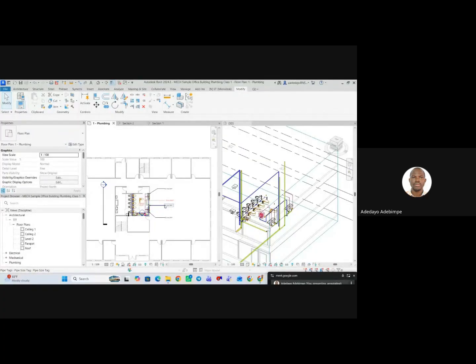Another part I would like to show is where BIM, building information modeling, shines. I want to get my material quantities. Let's get our material takeoff. So we need to generate a schedule for our materials. Now, we are assuming that we've designed correctly. As I said initially, the cost of change is the lowest during design as opposed to implementation.